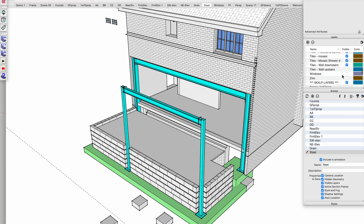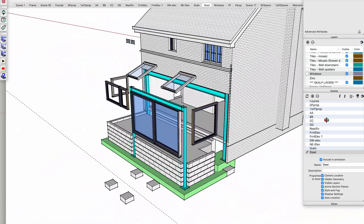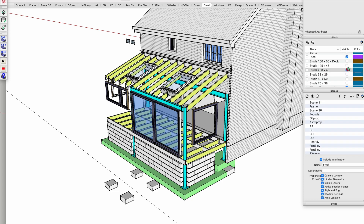Today is the day when the steel is coming, so it gives me a bit of time to talk about the logistics of it. All my sizings and calculations have to be right because we've pre-ordered the windows due to the long lead times. I've had to commit to these sizes, meaning the steelwork which encloses some of the large window sections needs to be absolutely accurate — and I'm going to find out today if that is indeed the case.